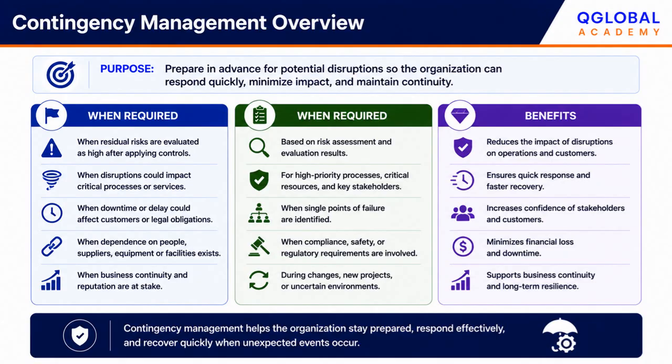Plans should be based on the results of risk assessments and should focus on high-priority processes, critical resources, and key stakeholders. Contingency planning is also valuable when single points of failure are identified, during major organizational changes, new projects, or when operating in uncertain environments.